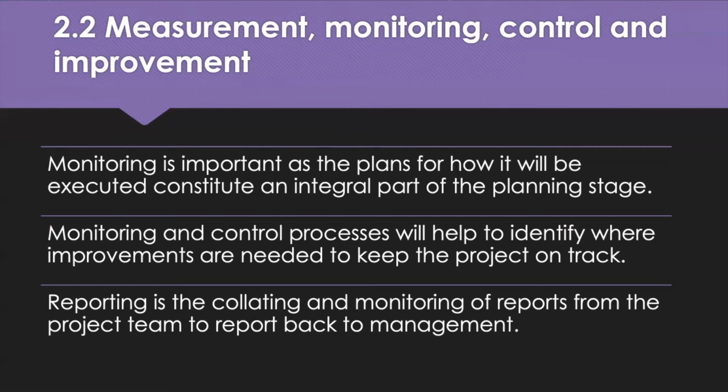The project manager collates the information and the monitoring reports from the team and will report it back to the project board. The report will include things like the financial information, progress against the initial plan, accountability and ownership, as well as the risks and earned value analysis. This is used to monitor the progress of a project. It compares where a project should be, known as the planned value, to where it actually is, known as the earned value. This helps programme managers evaluate whether the programme is on track to meet its targets.